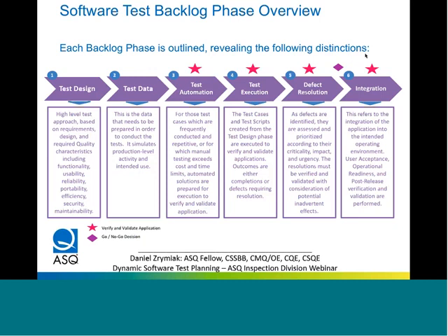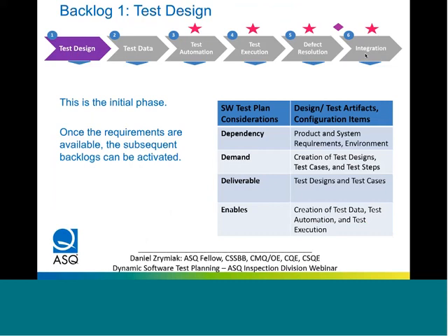And then by doing those, there's a go/no-go decision after the defects are resolved, and this go/no-go decision is not just based on completing the test, but also a level of comfort that the users have with the application and the readiness of the application to go into production. So what you're really doing is, the testing is not just to fill a checklist, it's to build a base of evidence to support a go decision. That's why you have to have the coverage to objectively make the case that what you're testing is suitable to be integrated.